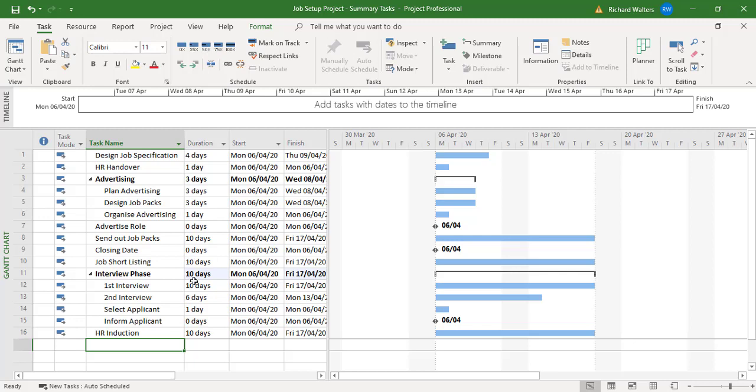If I link them and they go one after another, if I look at advertising for example - if the tasks go one after each other, you've got plan advertising then design job packs then organize advertising - that's an accumulated total of seven days. So when you link them together advertising will show seven.